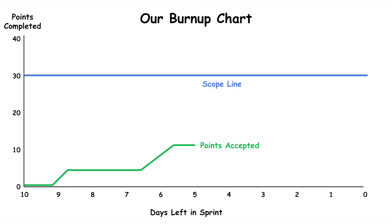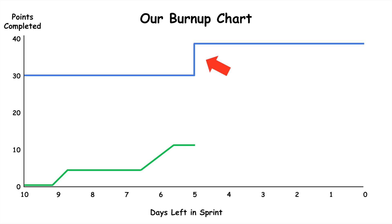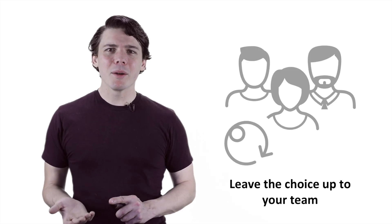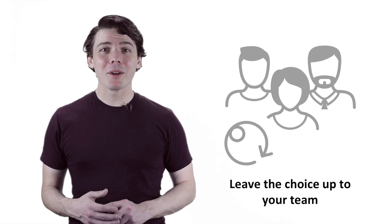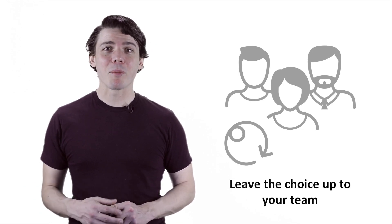A burn-up chart is similar. Rather than burning down to zero story points remaining, we burn up to a scope line. This can be useful on teams where scope changes frequently mid-sprint — a bit of an anti-pattern, but it does make it harder to maintain a pacing line. Since a reasonable argument can be made for either approach, burning down or up is often left to the team's preference.